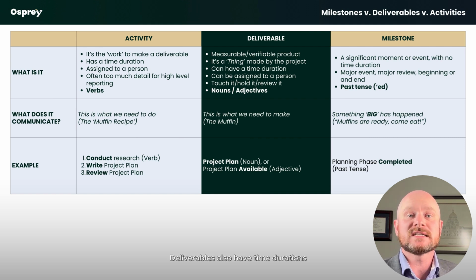Deliverables also have time durations, which is effectively a roll-up of all of the time durations allocated to each and every activity.